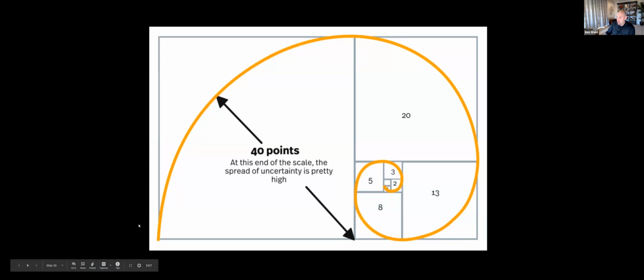When we are story pointing, we use a Fibonacci scale. We're giving cards or features 1, 2, 3, 5, 8, 13, 20, and never really 40. That is an estimate of complexity. Typically, one story point relates to one ideal uninterrupted day of engineering, although it's most importantly a measure of complexity. If you are looking at a board and you've got all 8 story point features, that's a signal that you need to break things down into much smaller bite-sized pieces.